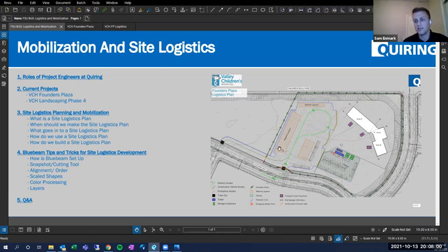But if you have a site logistics plan included in your subcontract that shows where they're going to be parking, and that was included at the time of bid, it's a powerful tool to educate them on how they should be figuring on doing the job as well. Not just keeping that to ourselves as a general contractor. And it's also something to educate trades as they come on site.